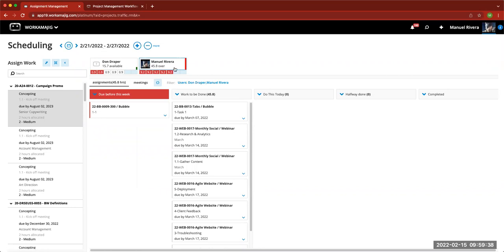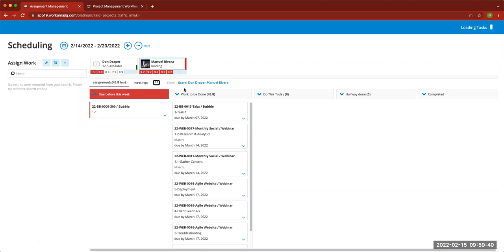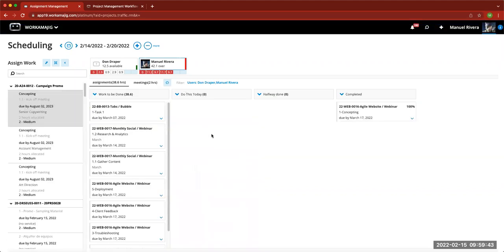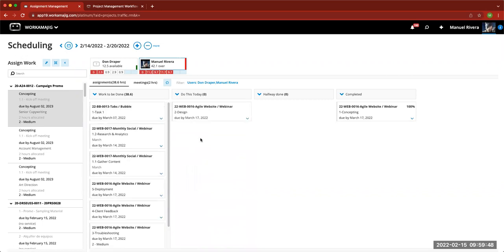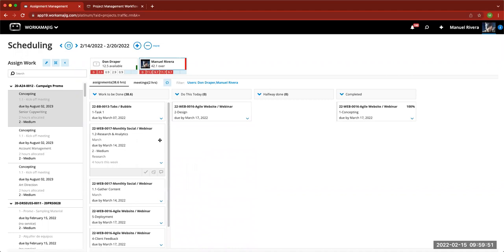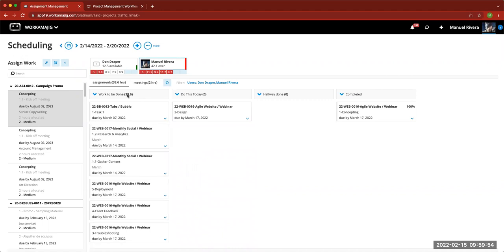Oh, and then as you're going through these columns, let me go back to my home column here for this week. Just know that the system is tracking what you count or have once the refresh happens. It is adding up the hours for the week in these totals. Now I push the refresh, right? This one has 3.5 hours, 3.48, right? It's just doing some rounding there for the week total as you see them. That way they have an idea of whether I am overloading the user or not in comparison to what they have available for that week for those statuses.